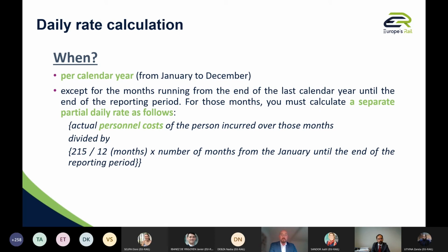So also, with the approach, you don't need to care anymore about what was the last valid calendar year and so on. Now you can also calculate your personal amounts, the amount of salary and so on, per calendar year. So you make your estimation year after year, you know how many years you would be involved in the project, and then you can calculate accordingly. So giving the focus, but again, this is for ex ante. You can consider the calendar year for the definition of the cost and also anticipate a bit of inflation.